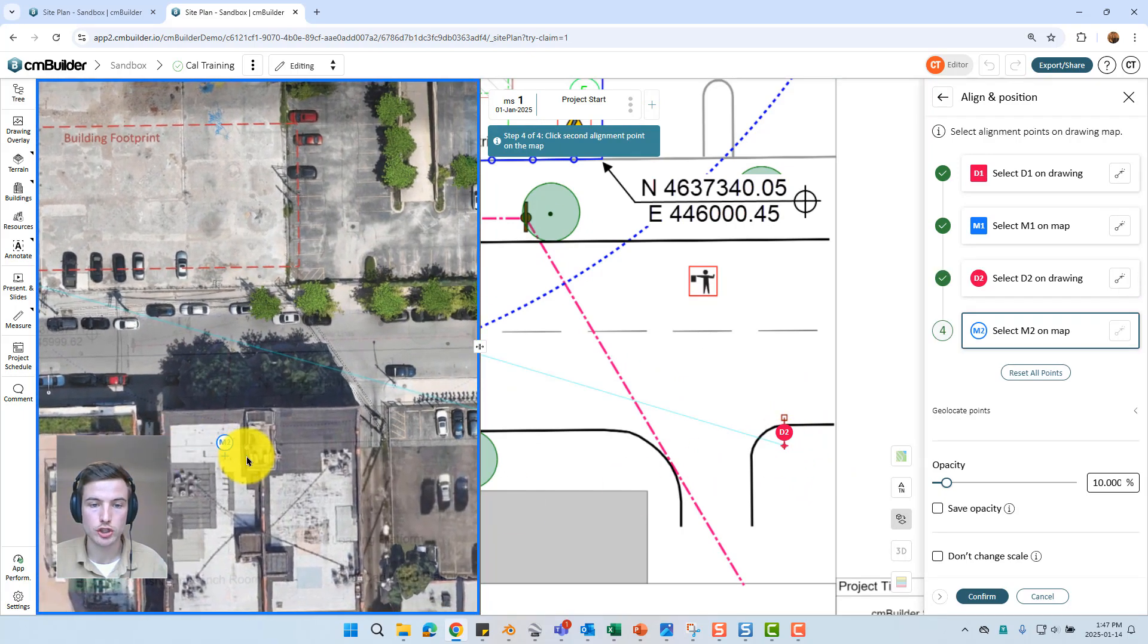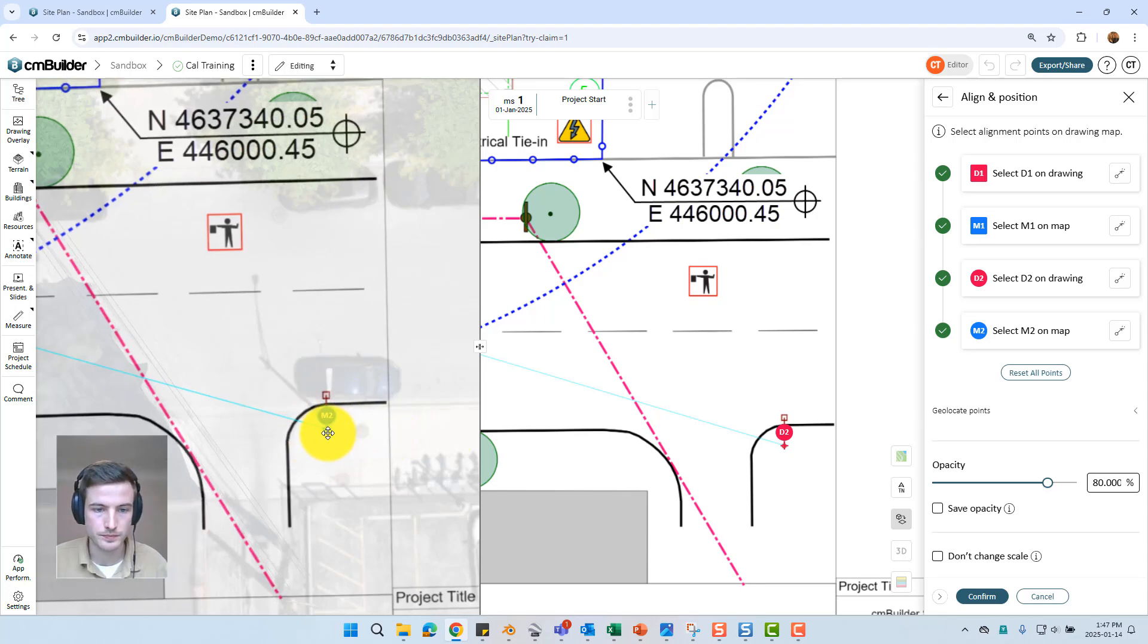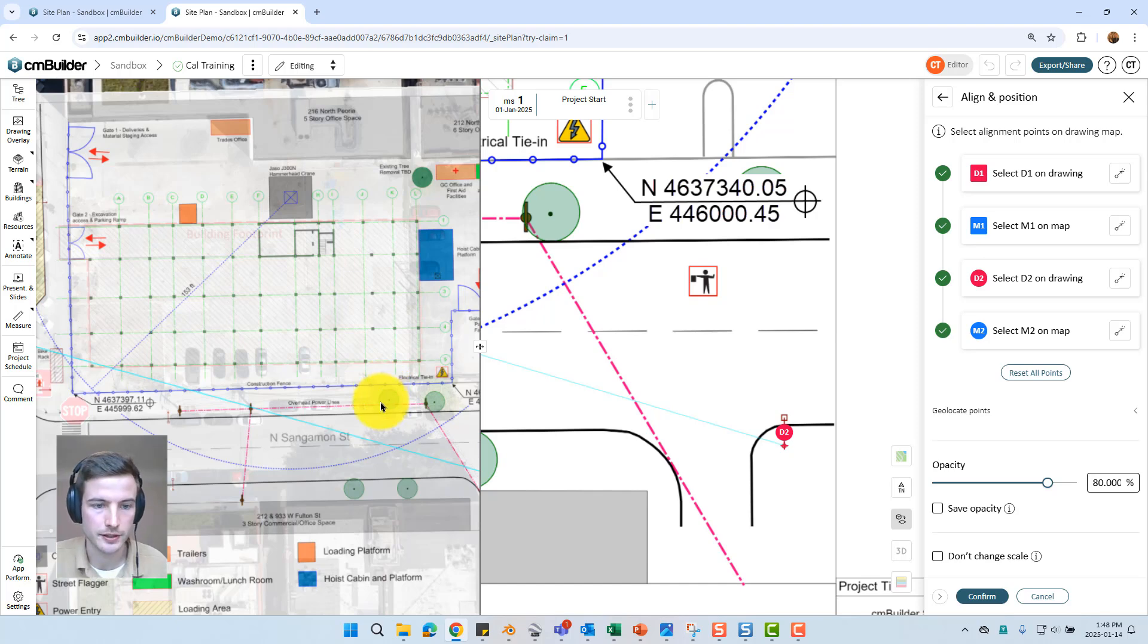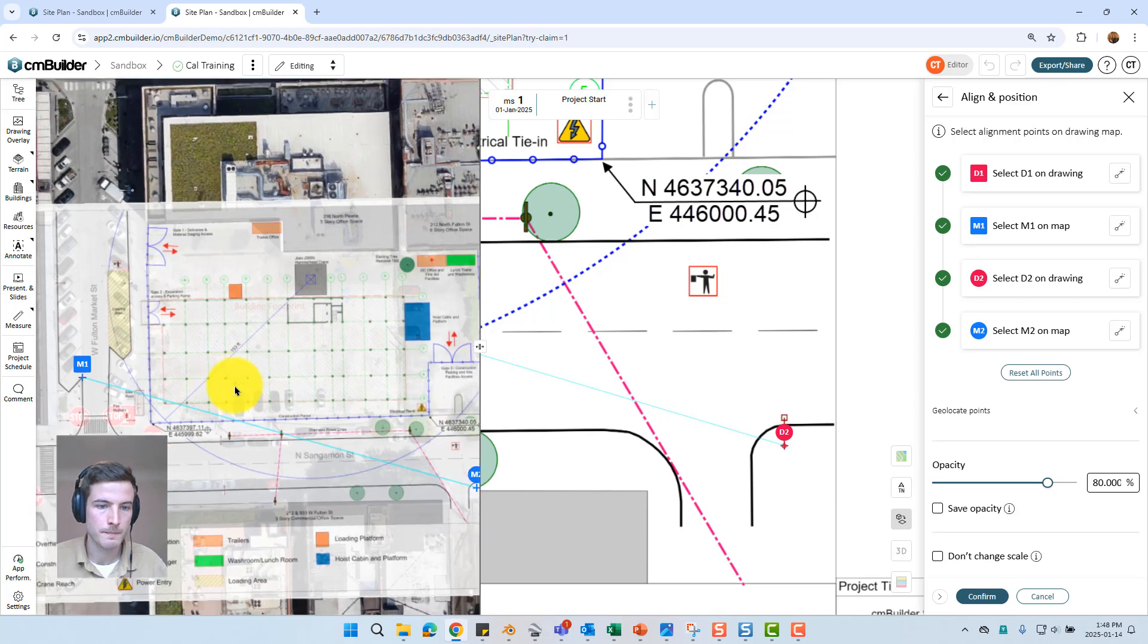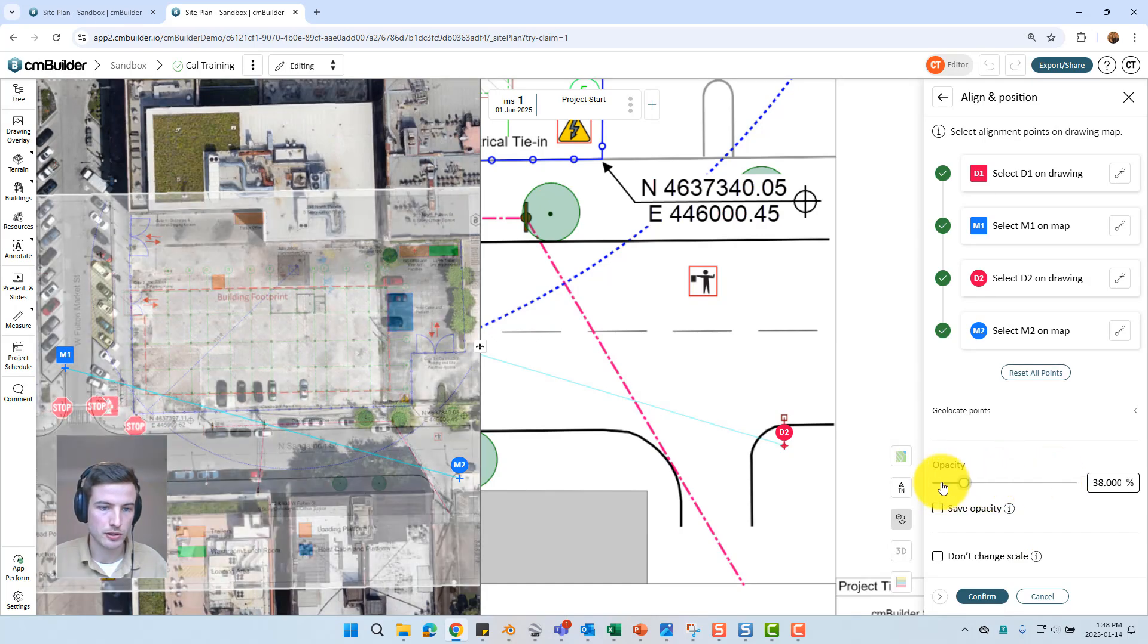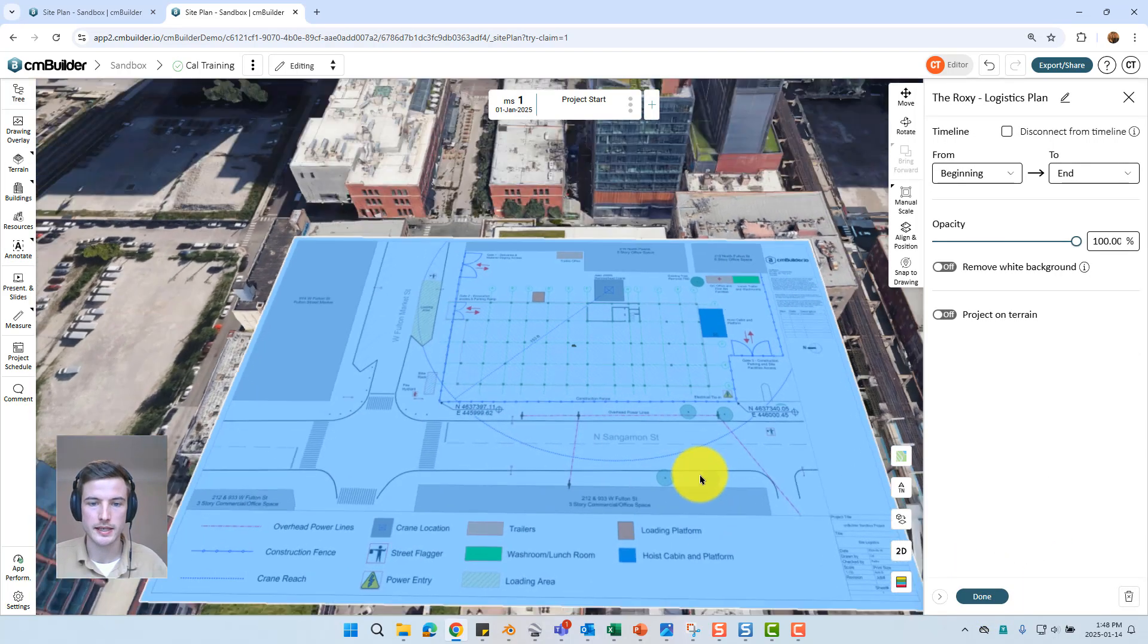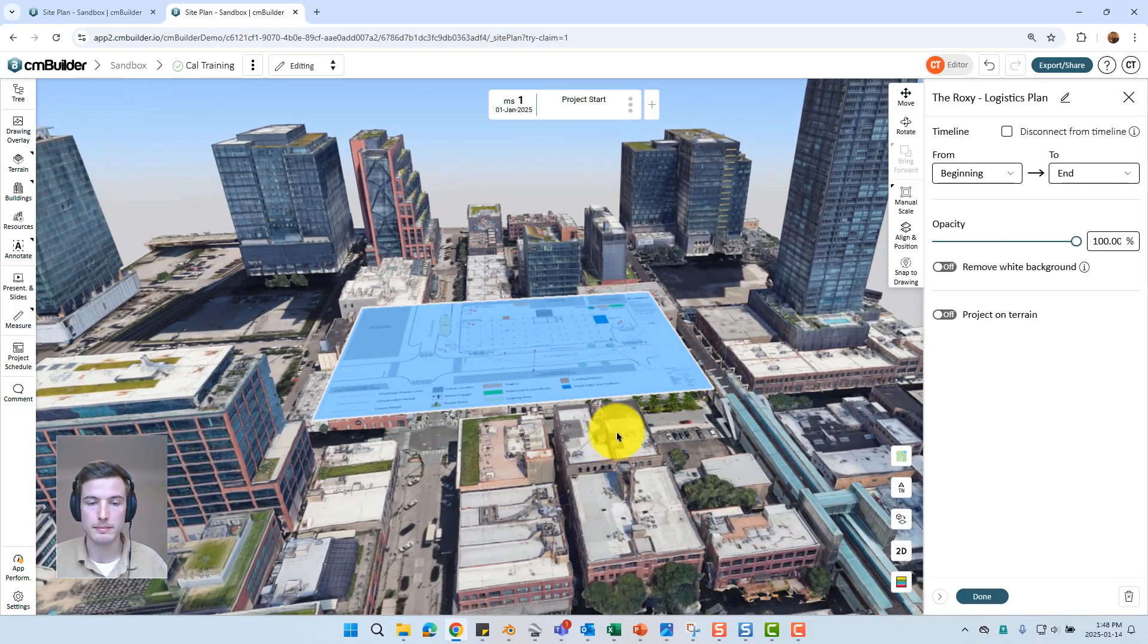When importing a drawing it's great to use an existing conditions plan or any sort of drawing that has some existing reference points that you can also find on the satellite image. You also want to make sure you use points that are relatively far apart. Of course you're inherently going to be a couple inches off selecting points off of a satellite view. A couple inches over 100 feet isn't too big of a deal. But a couple inches over 10 feet proportionally going to throw you way out of whack. And we can now see that drawing has been rotated, scaled and positioned in place. I can just bring up and down the opacity to verify that all those curves are lining up correctly. As I'm happy with that I can just select confirm and that drawing has been rotated, scaled and positioned.